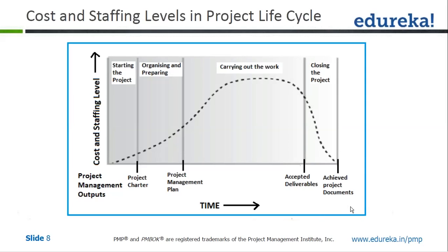The question that could come to your mind is why it is not IPEC. So the answer is every phase will have its own IPEC. When I'm starting the project, it will go through initiation, planning. To produce a project charter, you will do the initiation. Maybe your project sponsor will assign you as a project manager to create a project charter. He will identify first some stakeholders for you. You may have to identify further stakeholders for the project, and you will do the planning and essentially come out with a document called the project charter, which will have the high-level requirements, high-level scope, high-level constraints, high-level risk, and so on. High-level budget constraints will also be captured as a part of starting the project.